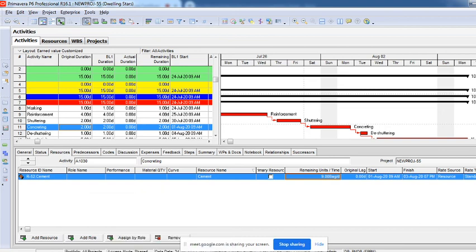So what you can do is go directly to this option called budgeted units. Where do we have that? Budgeted units here. For example, I need about 40 bags of cement. You can see here I'm just typing 40 bags for this whole activity, not per day. For the whole activity I'm adding 40 bags. So automatically, because this activity is of 2 days, it is dividing equally and telling 20 bags per day. But it might not be true. It's okay. For your accounting purpose, it is telling you 20 bags.